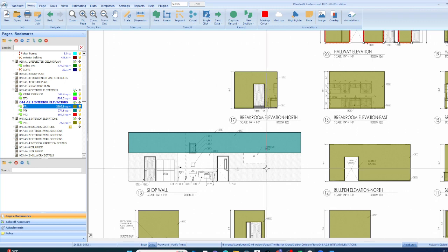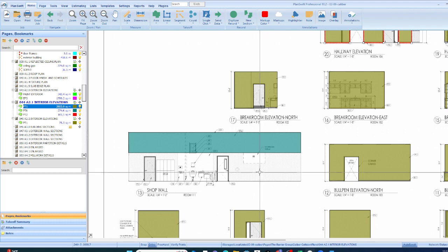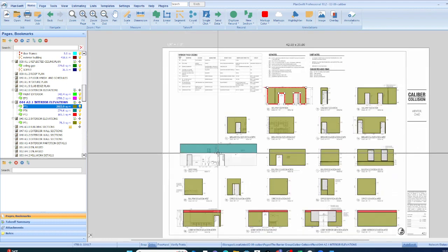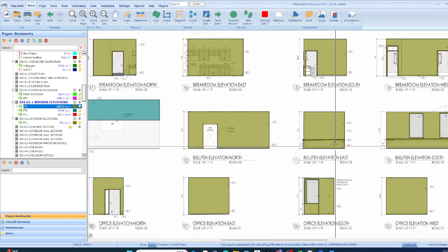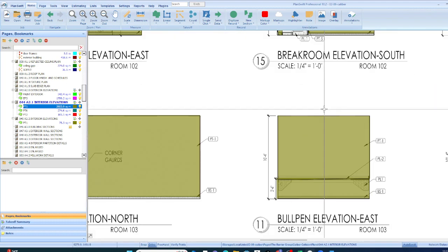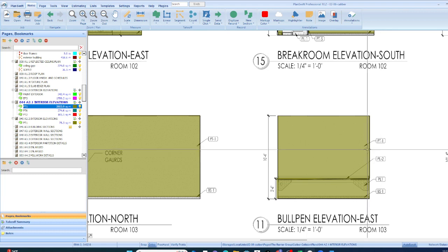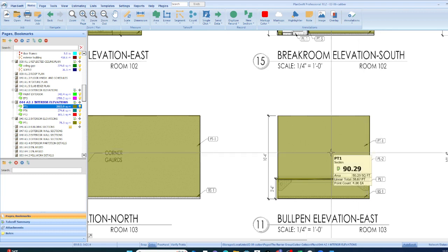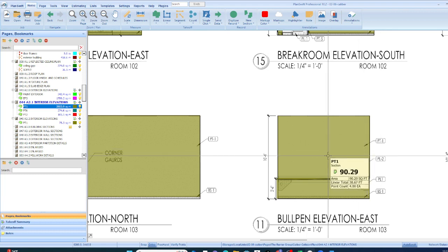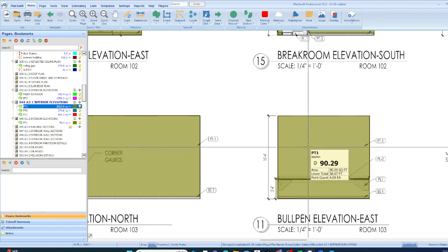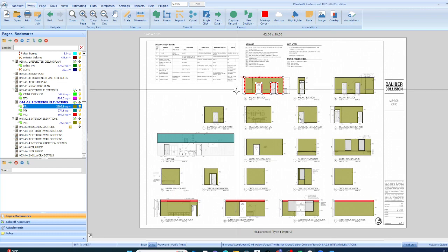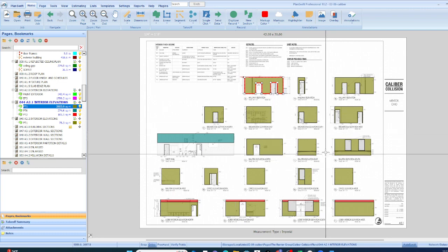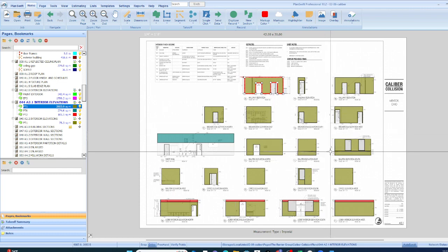And so that's why it's always important to look in the specifications first, no matter what your trade. Look in the finishes, paints a finish. And so you look in the finishes, under paint, and it will exactly tell you everything that's going to be painted in the project. You don't have to guess. And then you can go to that page, make your measurements.